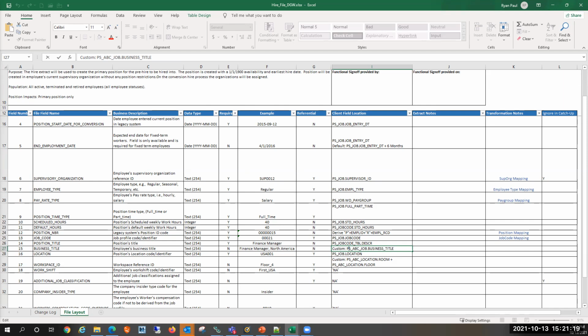If so, do we have access to that data to extract it? Or do we need to work with the third party to say, this is what we need, and a new contract with that third-party software provider to say, listen, we're going to end our contract on this date, but we need help converting data out. It's probably a new contract with new terms for service level agreements to make sure things are lived up to. Or are you going to keep on with the software?